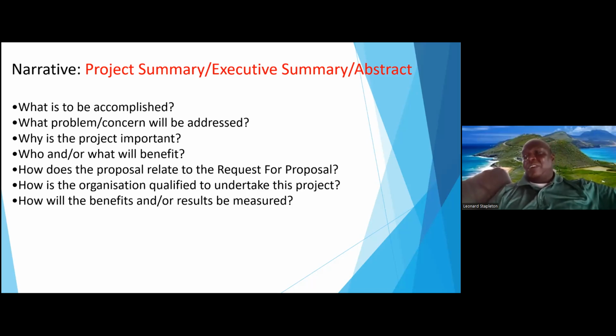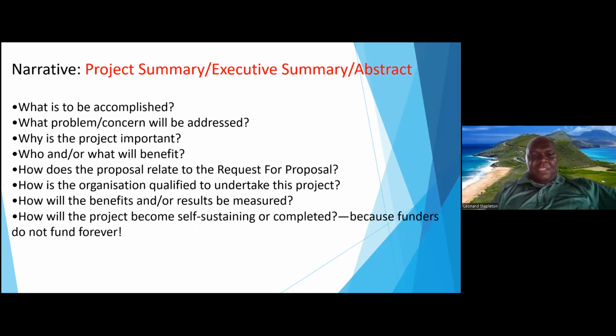So that now is where you're going to do practical things like maybe having them register or sign a name as they come. You're also going to see how many persons actually planted something after the time period they said they're going to do it. And so you could take photos. So these are different practical things you could do to show how you're going to measure your results.